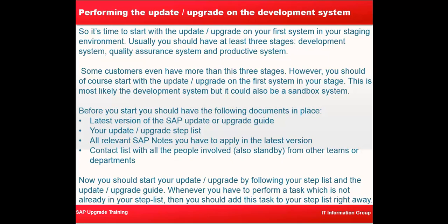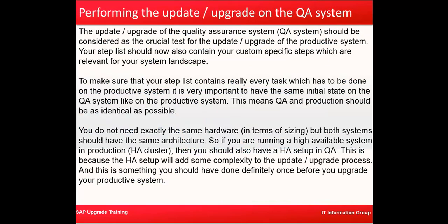system. So by the time you complete your dev system and your QA system, you have pretty much complete information, a complete list of all activities which need to be performed, which you have already performed in your systems. You have your learnings already there, you have your screenshots already captured with whatever errors have come and the fixes for those errors. Okay, the same thing we need to do in our QA system.